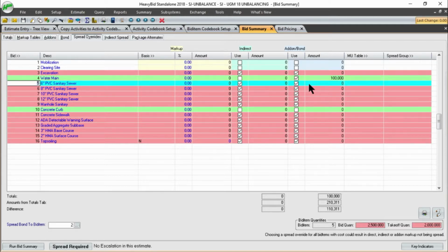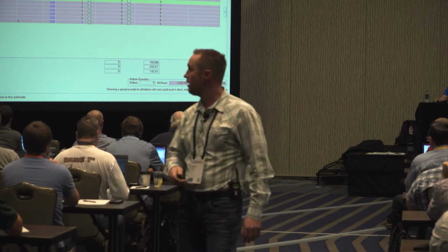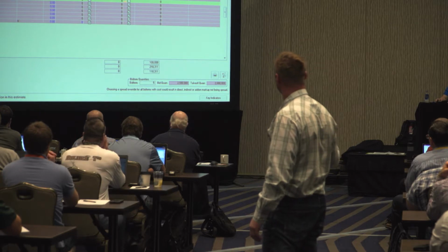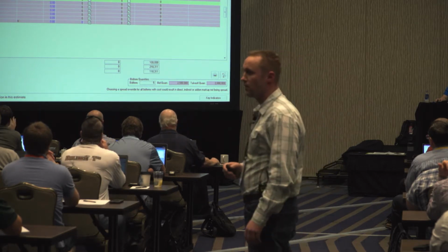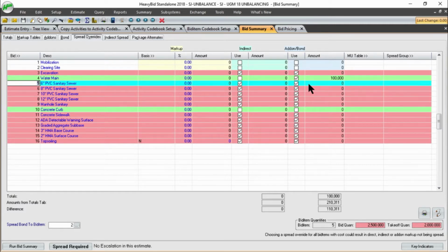Okay, now look what happened when we did that process. I manually sent $100,000. So it said, okay, you've called out all these items already that you said put no cost to. Now you're telling me use a lump sum cost of $100,000. I'm trying to spread 210. There's a remaining 110. Now, since you haven't told me what to do with that remaining 110, I'm going to take the remaining unchecked items, 1, 2, 3, and distribute it to them based on the rules that you told me.